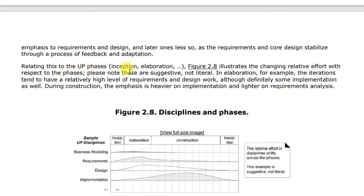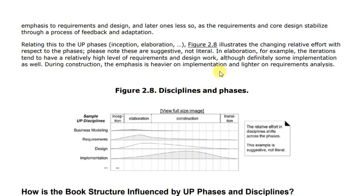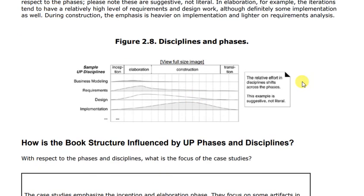Relating this to the UP phases — Inception and Elaboration — figure 2.8 illustrates the changing relative effort with respect to the phases. Please note these are suggestions and you can vary from project to project; it is just a general perception. Elaboration iterations tend to have a relatively high level of requirements and design work, while during Construction, emphasis is heavier on implementation and lighter on requirement analysis.